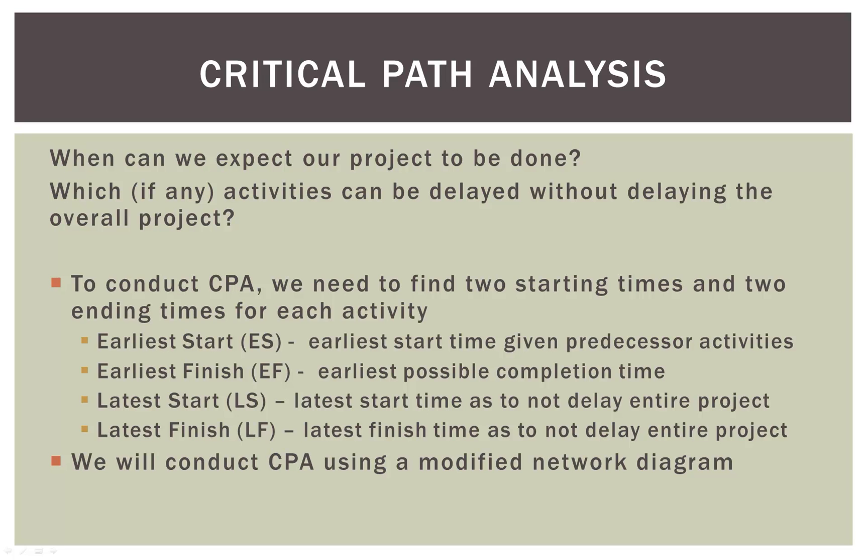Critical path analysis tells us where in our project we have some slack time in order to make our allocation of resources more efficient. To conduct critical path analysis, we need more information than we have up to this point. What we have to do is find two starting times and two ending times for each activity.